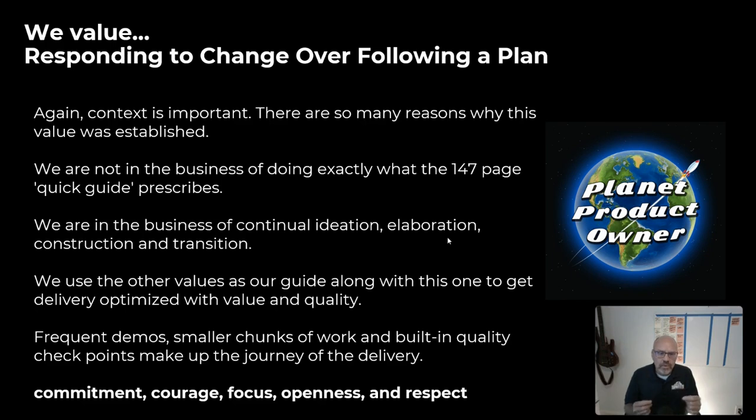Now notice the word responding. It doesn't say reacting. We're not going to react to change every time somebody comes in and says, no, we're going to do it, pull the plug and go over it. No, we're not going to react to change, we're going to respond to change. So frequent demos, that's a good way to start with this, right? Responding to change. Frequent demos helps you respond to change. Smaller chunks of work with built-in quality checkpoints, that is an excellent way to respond to change. So all of these things kind of make up the journey of the delivery.